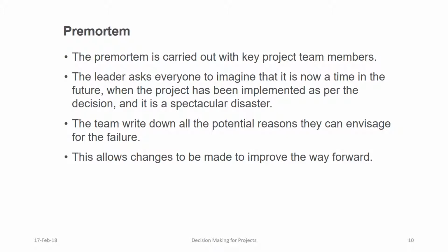The dimensions of a good decision, explained in the second training video, could be used as prompts to help find reasons for failure. For example, did it go wrong because of incomplete or inaccurate information? Did we look at sufficient alternatives? Has sound reasoning been used when selecting the preferred alternative?